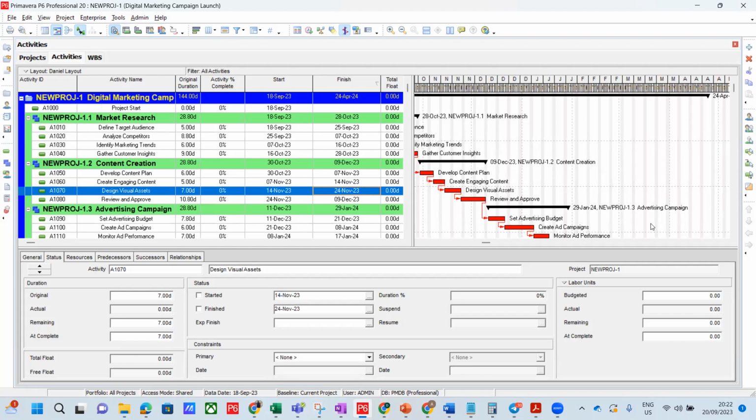You must apply constraint as a team, collaboratively. So everybody must agree, saying, okay, that constraint should be there. Why is that constraint there? What do we need that constraint for? That's why if you're working on any project, they will try as much as possible, if you can avoid constraint, they will tell you to avoid it, because it doesn't allow things to flow.